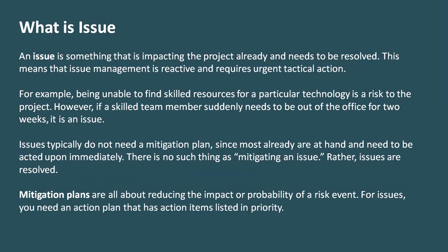Now, let's understand what is an issue. Issue is something that is impacting the project right now. In my previous example, when we anticipated that the demand will be approximately 1,000, the 10% deviation, so we had manufactured 1,100 laptops, but now the actual demand after seeing the laptop is 2,000. Now, we are not able to meet this demand. There's a supply crunch. This is an issue, right? This issue has to be resolved right now.